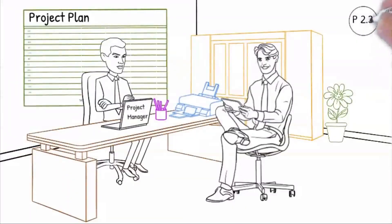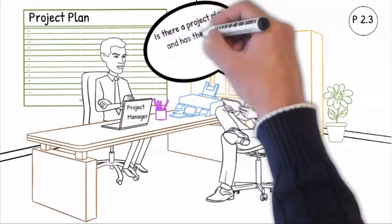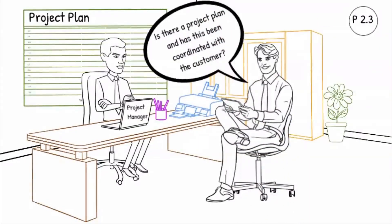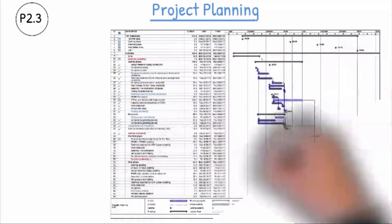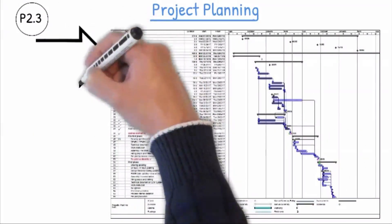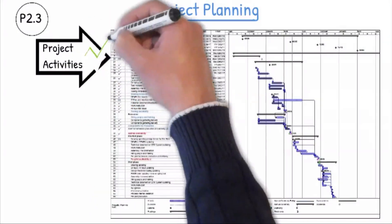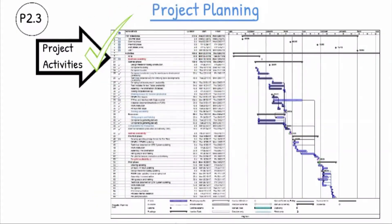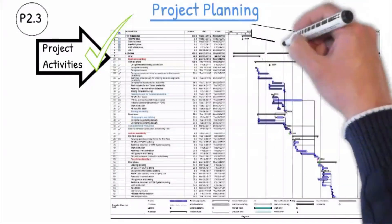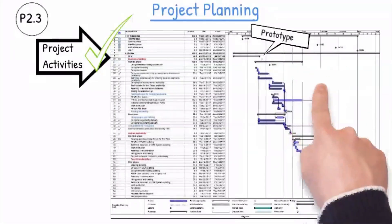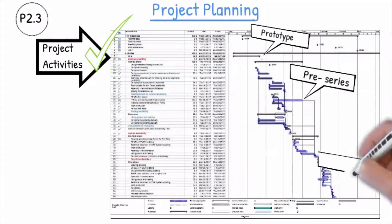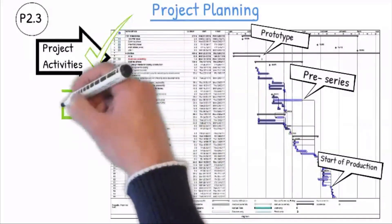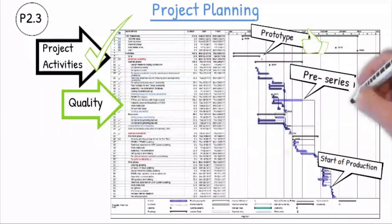Question P2.3: Is there a project plan and has this been coordinated with the customer? The project plan meets the specific customer requirements. All defined milestones are fully incorporated in the project plan according to the customer development and production build phases and the internal realization phases. A review is carried out at the milestones defined in the project plan to check that all planned activities are carried out and that the level of maturity required is achieved. The quality-related project activities must be part of the project plan.